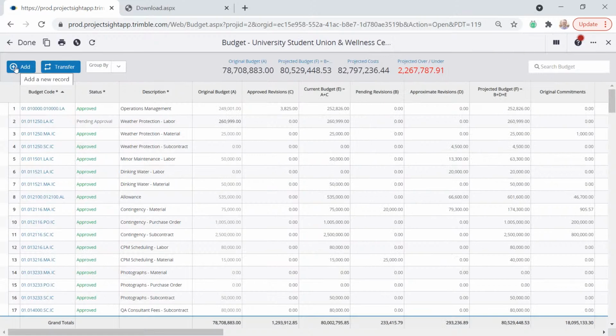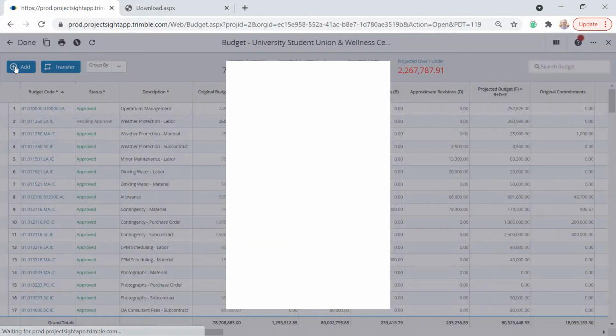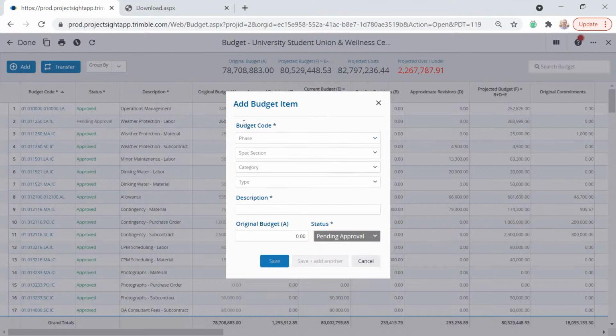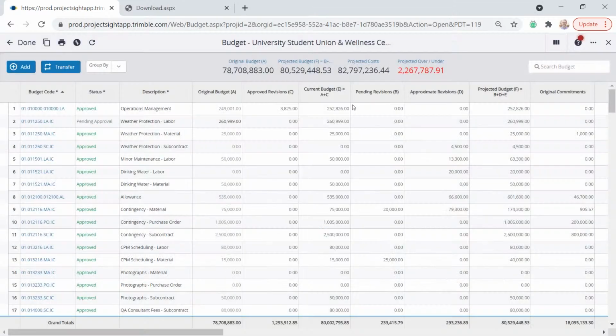This can be just added manually. That's not the typical process. What the typical process is, we create your budget code structure based upon mimicking either the ERP, wherever you would like, based on, we have 9 different code levels we can do, right? And so once you have that set up, then you can just simply import the budget. So that process is an export of an Excel file and then a re-importing of that Excel file.